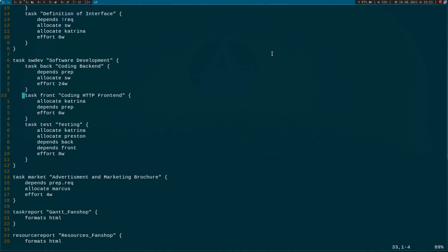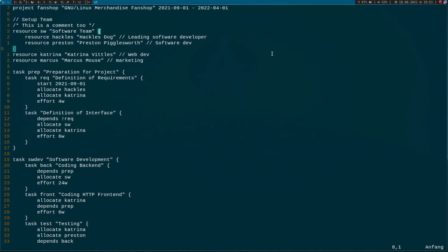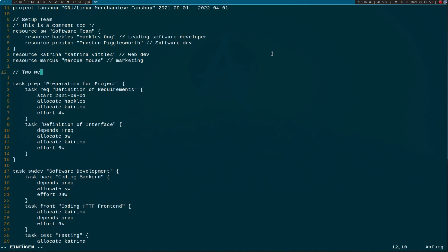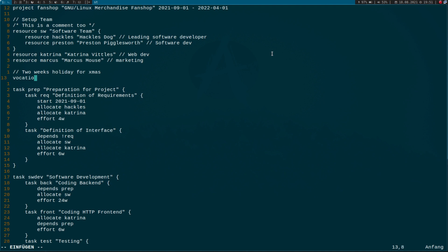Maybe one more thing. Our project goes over Christmas and everyone likes to have Christmas holidays. So let's make 2 weeks holiday for Xmas, okay? So here I have to type vacation. The name, or the reason for the vacation, is Christmas. And now we can put a start date in here. So our Christmas holiday begins on, oh, this is a little bit late for Christmas holiday. Yeah, let's say Christmas holiday begins here and it will go to, yeah, this should be about 2 weeks. And now every resource has holiday over Christmas.